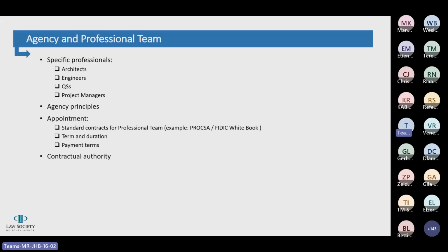And when it comes to payment day, the employer simply says, well, I'm not going to pay because your contract has expired. So I just want to put all of your focus on that, because that's something I think needs to be brought to everyone's attention, specifically if you're in the services industry. Some of the contracts also have an automatic renewal provision, so that the term of the contract can be renewed after a particular period.